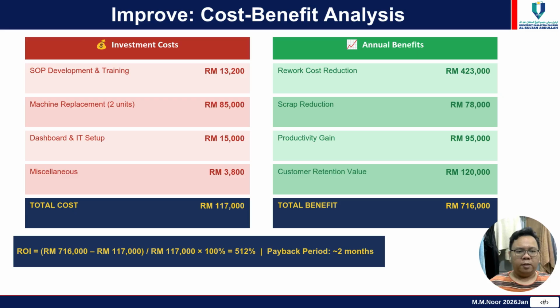The financial analysis demonstrates the value of the project. The total investment required was 117,000 ringgit, while annual benefits are estimated at 716 ringgit. This results in a return on investment of 512% and a payback period of approximately 2 months.